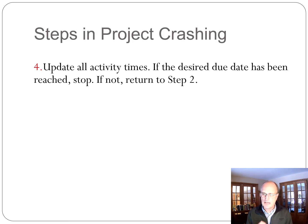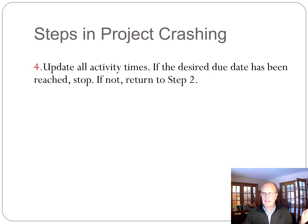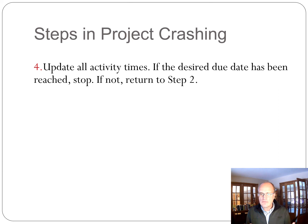The last point: sometimes students struggle with the concept that you need to shorten two activities because there are two different critical paths, yet the whole project only shortens by one day. You shorten this activity by a day and that activity by a day, but it still only shortens the project by one day because there is more than one critical path. Those are the tricks to watch out for. Look at the example I post as well — I think it'll make things much clearer. If you try it a couple of times, it intuitively makes sense and can be relatively straightforward. Good luck with project crashing.